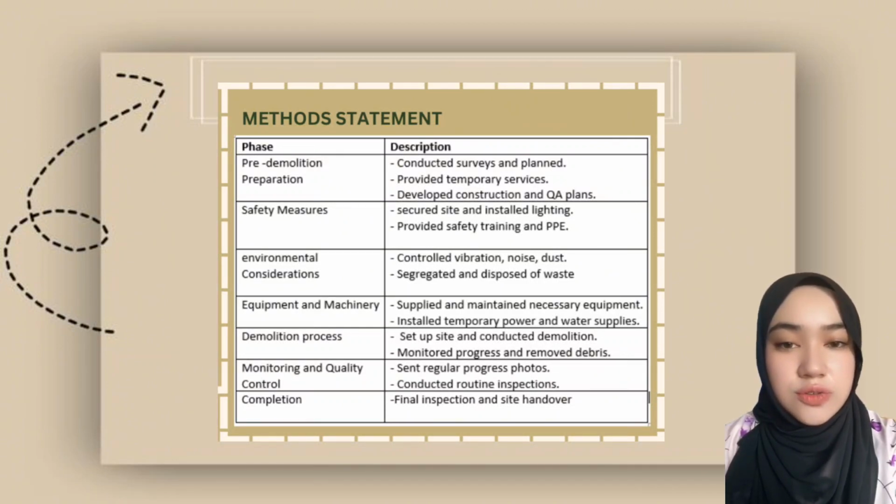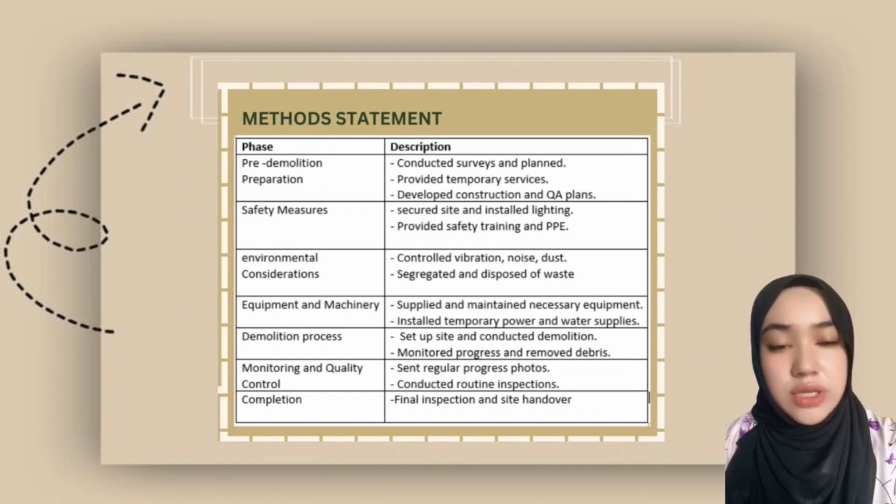Workers received thorough safety training and were provided with personal protective equipment. On-site facilities were set up to support their needs. For the environmental consideration, to minimize environmental impact, measures were implemented to control vibration, noise and dust. Techniques like water spraying and dust screens were used.